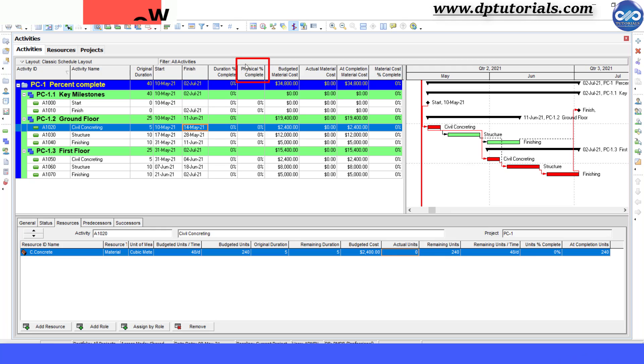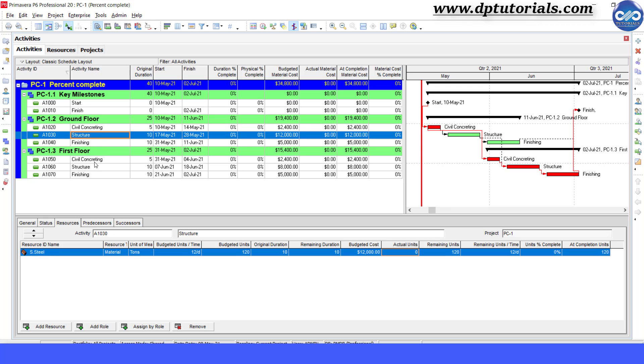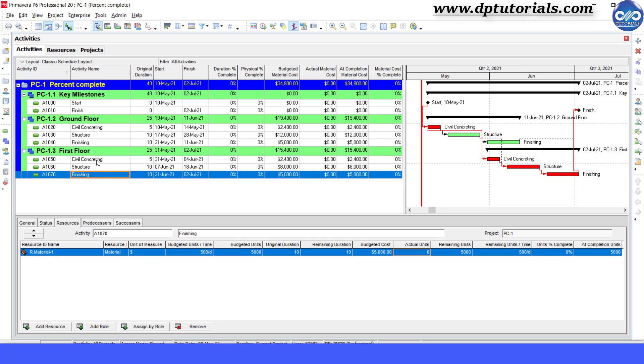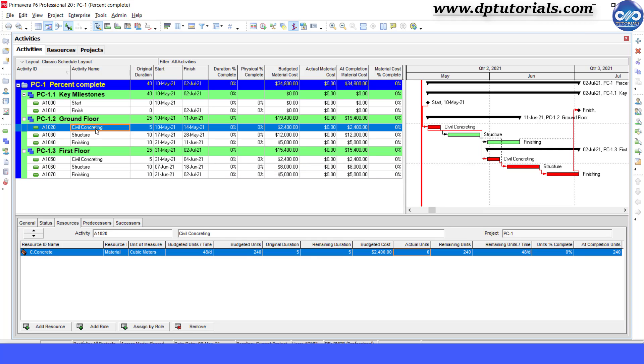Now, this is my sample schedule. The material resource for the civil concreting activity is the concrete. Let us measure the progress of civil concreting activity based on cubic meter of concrete as a resource. We already have the resources loaded in the schedule like this.